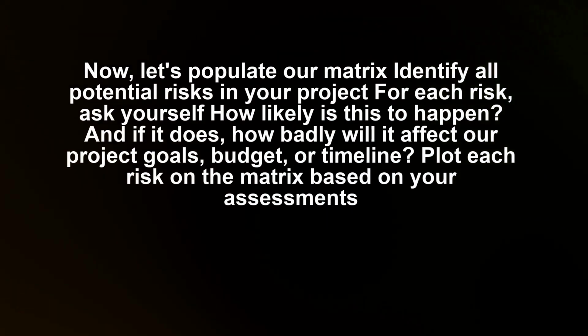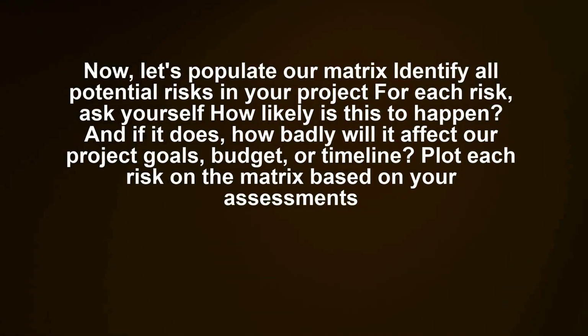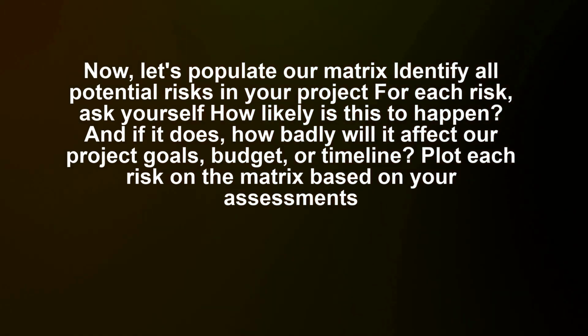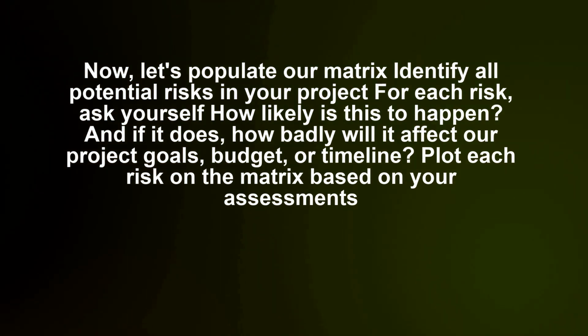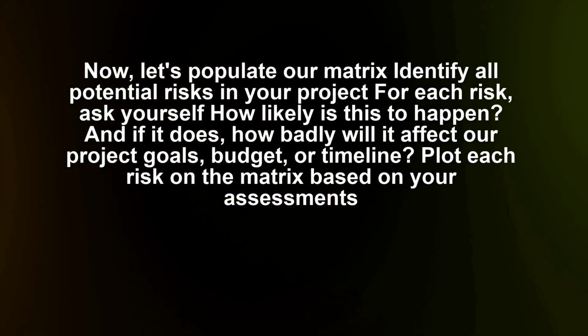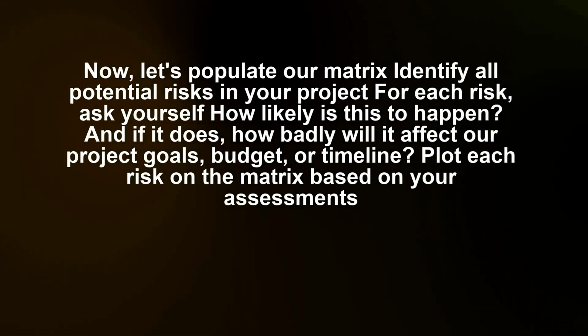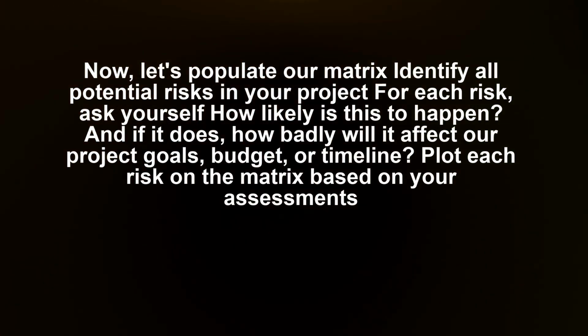Now, let's populate our matrix. Identify all potential risks in your project. For each risk, ask yourself, how likely is this to happen? And if it does, how badly will it affect our project goals, budget, or timeline? Plot each risk on the matrix based on your assessments.